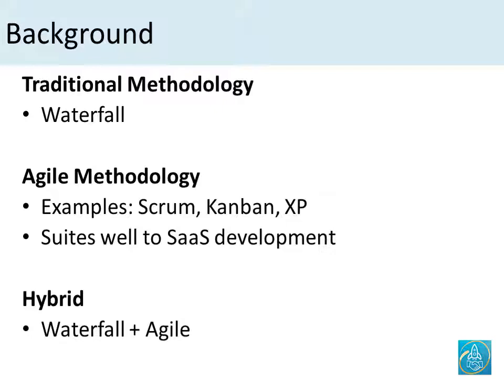The waterfall methodology is rigid, where all the different activities such as research and planning, requirements gathering, design of the architecture and the application, the actual software development, testing, and user acceptance testing all take place in separate phases. There's no overlap. The scope is well defined, and typically the release cycle is long; it could be 6 months or go up to a year.